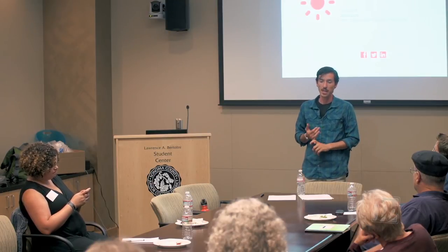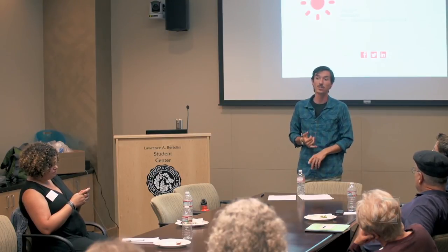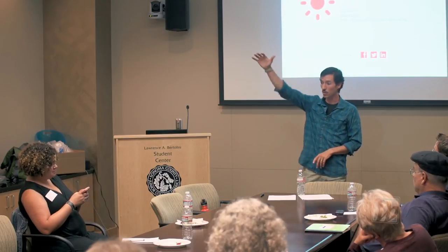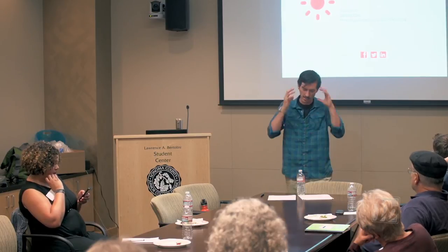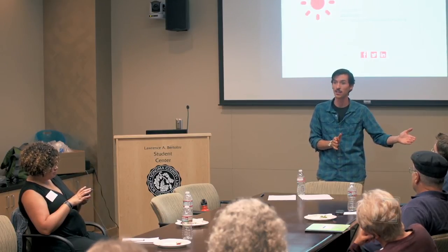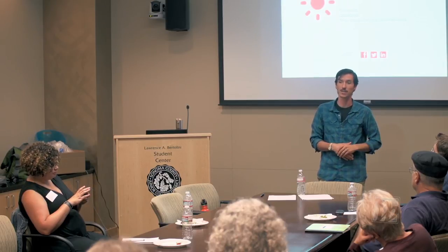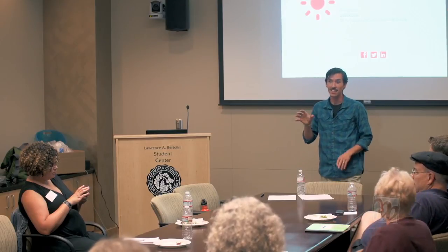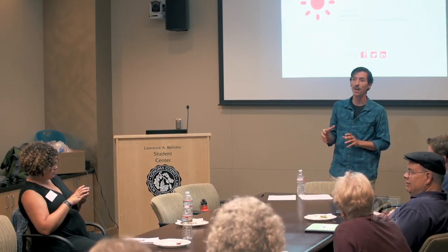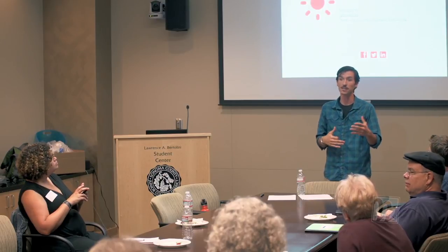The other thing that I do is I double my original estimate. I'll go through a project and break it out into the specific tasks. Then I'll sit down and go, okay, that particular piece, if I sat there and coded it, this is what it's going to look like. And then I double that. And that tends to be pretty accurate. If you're just starting out, triple it. You might have to charge them less because you're like, yeah, that's going to take 500 hours, sorry. But that adjustment for the time allows you to take into consideration that extension.